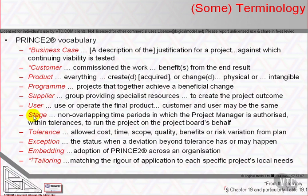Authorization ceases if we step outside of, or suspect we will step outside, the tolerances. Tolerance: the permissible deviation above and below a plan's target for time and cost without escalating the deviation to the next level of management. There may also be tolerance levels for quality, scope, benefit, and risk. Tolerance is applied at project, stage, and team level.